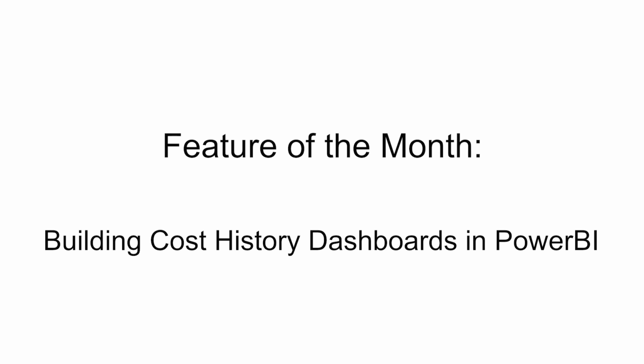So just a little recap, our latest version of DESTINI Estimator supports multiple users working in the same project at the same time. So what that means is the users work in the estimate, their changes are being stored in an estimate database, as opposed to previous versions where those estimates would be stored in a file. So the versioning of estimates at specific milestones allows users to go to a specific milestone of the project for viewing, branching, making changes, and ultimately comparisons. So really the comparisons piece is what we're going to talk about today.